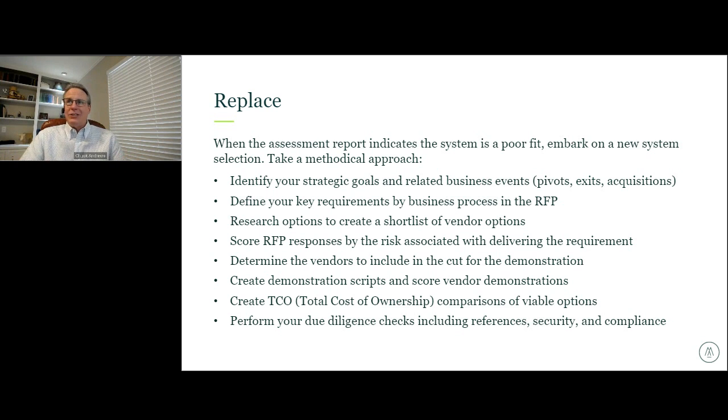How do you support this? Is it a stock piece of functionality? Does it require customization? Does it require a third party? Things of that nature. And what that allows us to do is to get a risk profile for what's involved in implementing that system and where the gaps are. A vendor not meeting one requirement may not preclude them from being a potential solution, but when it comes to implementation, we're going to understand where we need to dial in on that statement of work as we're engaging that vendor to make certain that that piece of functionality is addressed.